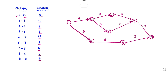The name of the activity is placed above the arrow mark and the corresponding duration is placed below the arrow mark. So: 1 to 2 duration 5; 2 to 4 duration 1; 4 to 7 duration 12; 2 to 5 duration 6; 5 to 7 duration 3; 7 to 8 duration 4; 6 to 8 duration 6; 3 to 6 duration 7; 1 to 3 duration 10.